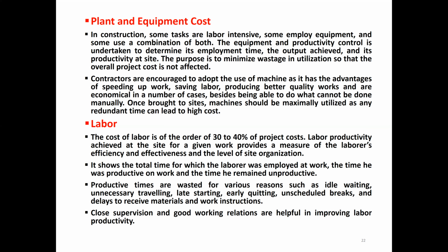So productive times are wasted for various reasons such as idle waiting, unnecessary traveling, late starting the work by the laborer, early quitting by the laborer, unscheduled breaks, and delay in receiving materials and work instructions. So labor is just waiting. So we have to manage labor properly. Close supervision and good working relations are helpful in improving labor productivity. So we should monitor closely.